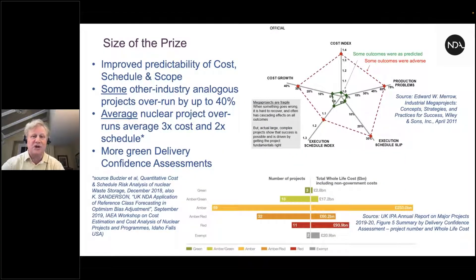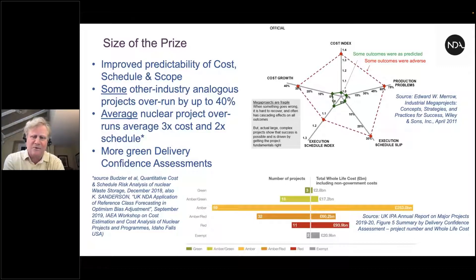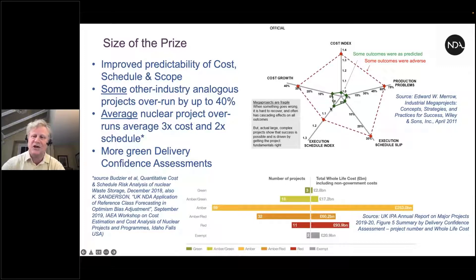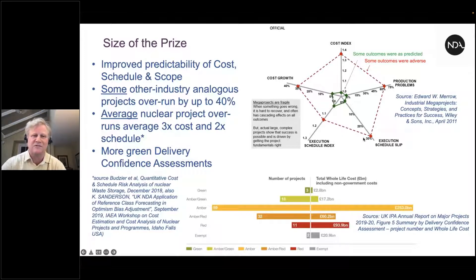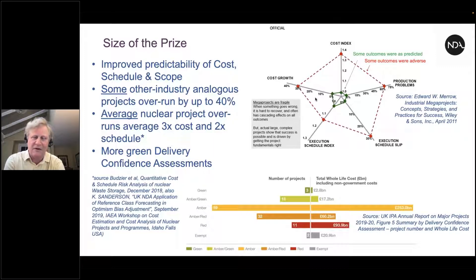The size of the prize: framing improves the predictability of cost, schedule, and scope. Looking at Ed Merrow's global database from IPA Global, projects can go awry and when they do, particularly the mega projects, cost can grow by 30 percent and schedule can slip by 30 to 40 percent, with significant production problems too. Everyone on this call will be familiar with what project failure looks like in terms of cost and schedule overruns.